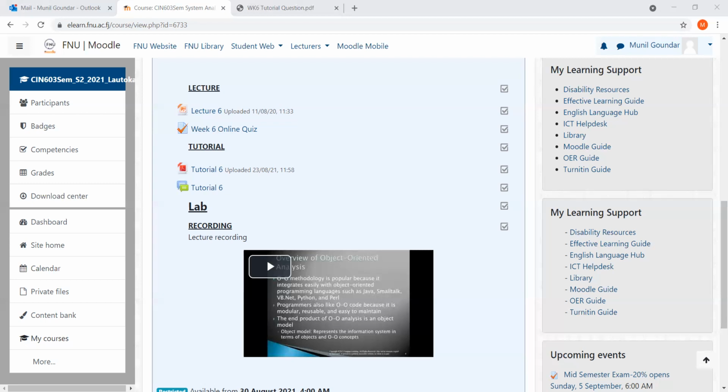Now this website, the predecessor is 7, finishes on the 9th, so you'll start on the 10th of Feb 22. Plus 5 is 15, minus 1, 14. So 14 Feb 22. Over here, your next date is going to be 15th of Feb. Now do notice the predecessor is 8, which is test website. So 14th, it starts on the 15th of Feb 22. Now, 15 plus 2 gives a value of 17, minus 1, 16. So 16th of Feb, 22.